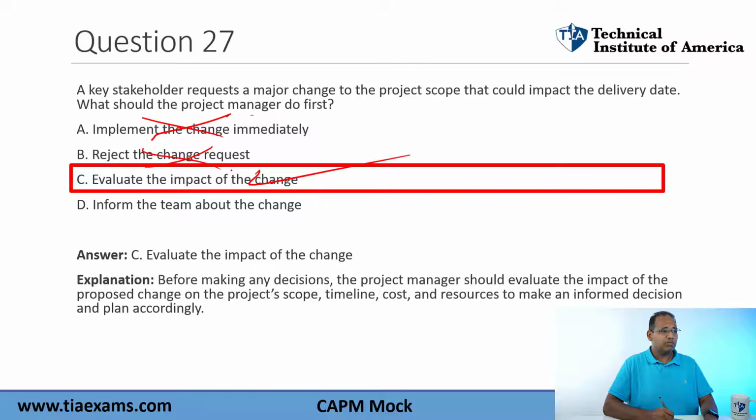You, the project manager, probably don't have the ability to reject changes. That's generally going to be done through the project sponsor, but the project sponsor is going to probably have you assess the change first. Never reject changes. Always remember that. On your exam, if you hear something about rejecting a change, never the answer. Unless they say what not to do. Inform the team about the changes. While this is good, the team is going to help you to evaluate the changes.